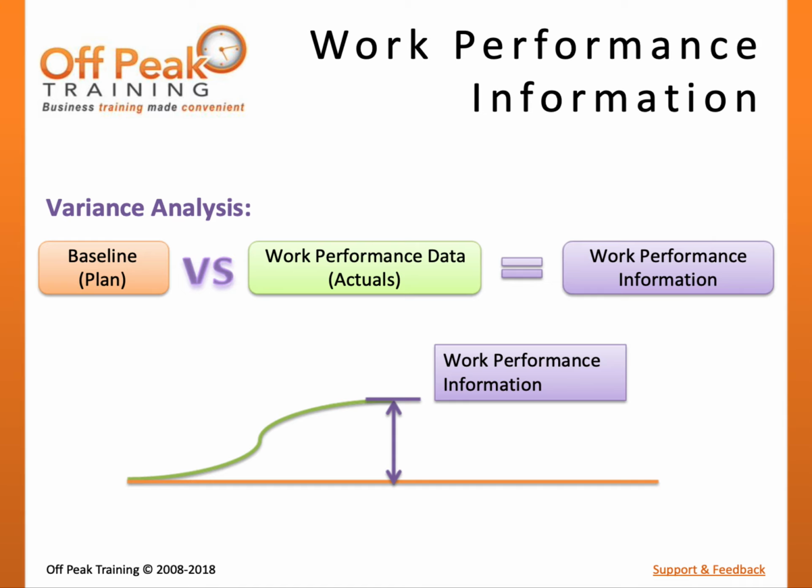When the sponsor asks for a brief report on the health of the project, the project manager cannot simply hand over all of the team's status reports. The sponsor expects the project manager to perform analysis and present a comparison of where the project is versus where the project is supposed to be. Work performance information represents the outcome of variance analysis to be used for future project reporting.